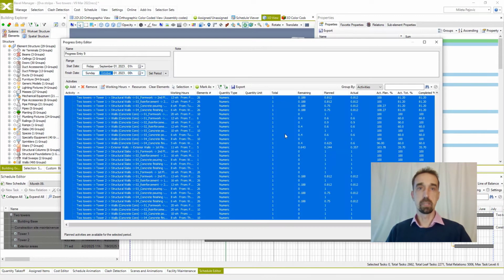Based on selected BIM elements from the group, our engine recognizes all tasks and all activities in which these elements are supposed to be executed in that marked time range. Based on quantities of these selected elements, the system also calculates and populates actually executed quantities for each task.